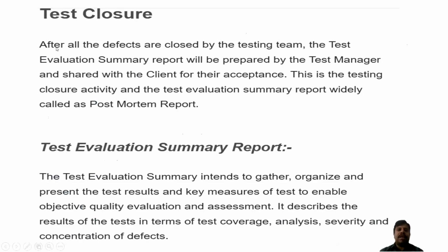And finally, the test closure. After all the defects are closed by the testing team, the test evaluation summary report will be prepared by the test manager and shared with the client for acceptance. This is the test closure activity, and the test evaluation summary report is widely called a post-mortem report. The test evaluation summary intends to gather, organize, and present the test results and key measures of the test to enable objective quality evaluation and assessment. It describes the results of the tests in terms of test coverage, analysis, severity, and concentration of defects.